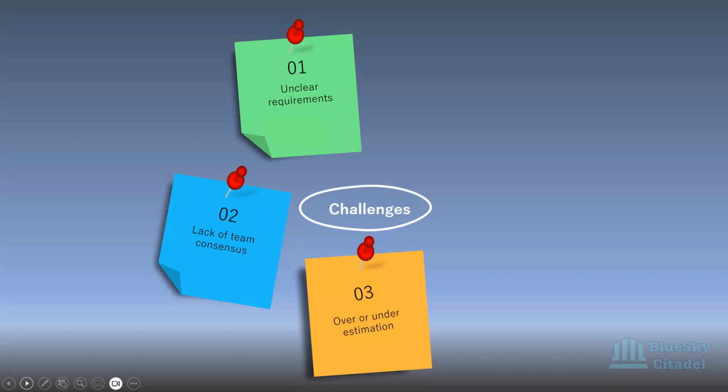Again, that is due to a level of experience. So I've used the example of the man with 15 years' wealth of experience, but he's just coming into a new project. So it's giving it the buffer to say that, okay, because I'm just coming in, I don't understand this domain. I know I've never worked on this domain before. And as a result, even if I look at where I'm coming from, if I have a story like this, definitely I would have given it a 3, but because I don't know the domain I'm working in, I'm just coming in, I don't know how their system works or what their system is, I'm just going to learn all that. And as a result, I'm going to give it a 5.